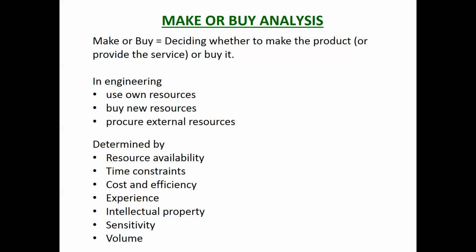So you have to go out and procure it from an external source. Cost and efficiency. Some organisations are better set up to do work than others. So it might be that your company is laying a road, you don't really have a good road laying crew, so you're going to subcontract it out to someone. You've got people that could probably do it, but not as well or as quick or at as low a cost as the other company. And you still get maybe 10-15% profit on top of the work they do, but it might be that even with the fact that you're getting someone else to do it, it might work out less expensive than using your own resources.